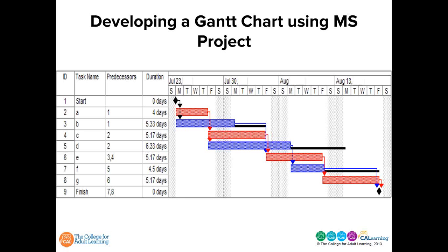When you prepared the WBS, you will have also calculated how long it will take for a task to finish. Enter that figure, now usually calculated in person days, against the appropriate tasks. You'll recall we did this using the network diagram and calculated the time it would take for each activity with the total time for all the task activities. Now, as I mentioned, if you want to, you can enter the proposed start and then the proposed finish date, and you can identify resources here, so you just enter the names of the person responsible for the completion of the task. The next critical thing to add to the Gantt chart are project milestones.